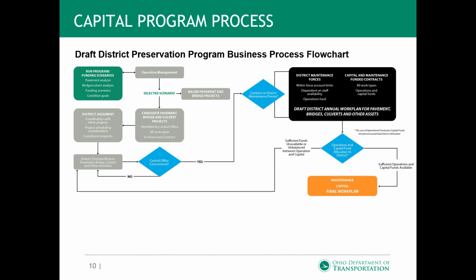At the same time, on a parallel track, we have the maintenance and operations people. They are zero-based funding, okay? So they're going through and identifying what they need to be able to do their day-to-day work and come up with a funding mechanism. So going back and forth, what comes out of the pavement management system, for example, may be a project that's 3 or 4 years off. Well, the operations folks will see that and realize that they've got to do what we call a gap project to hold that roadway or that bridge or culvert or whatever over until the capital program comes.